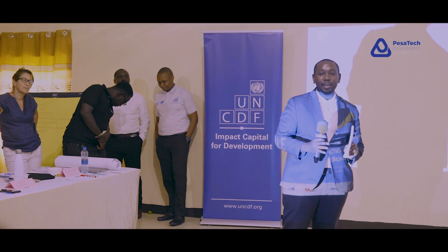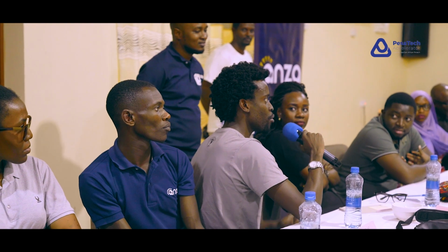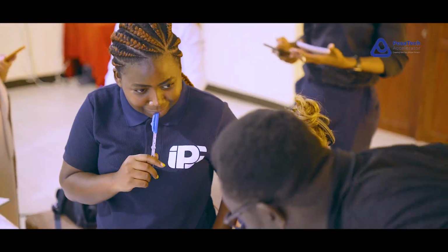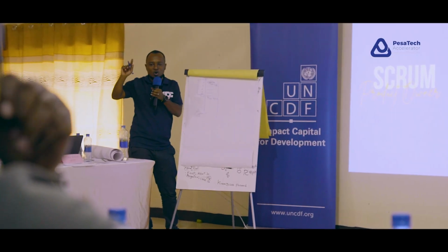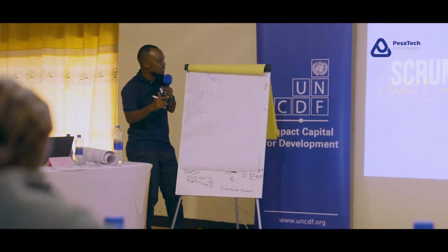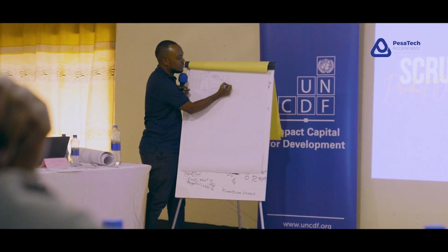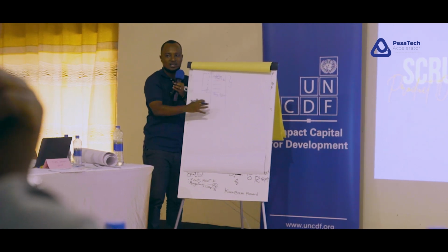So as a product owner, their job is to say, we are going to do this first. Number 5 will come here. That is ordering the product backlog to best achieve the goal and mission. That's what we're talking about, maximizing the value of investment. If your team can work only on 3 items from here, you need your best item to be on top of this stack.